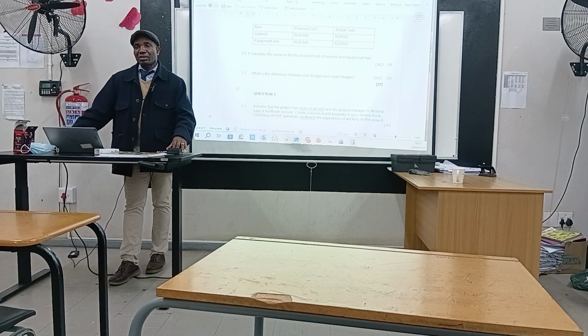Then the actual cost is what was spent on the project. So, like I said, at the end of the day, you need to sit down and do a kind of reconciliation to see whether the planned cost is equal to the actual cost. In a situation where the planned cost is different from the actual cost, we call it variance. So it's something that one really needs to look at. It's very important as far as the execution of a project is concerned.